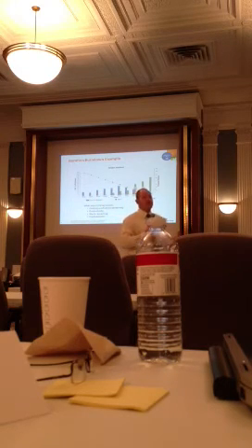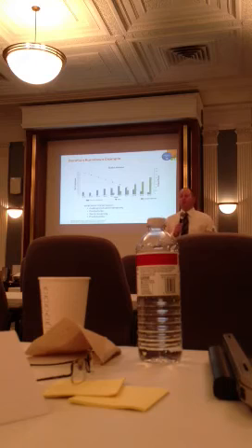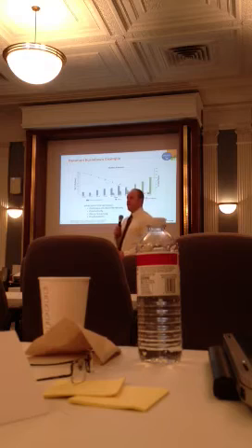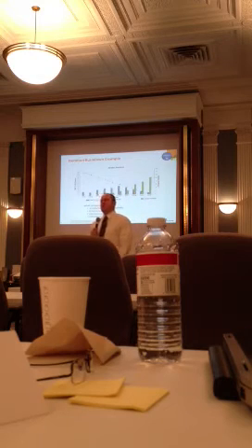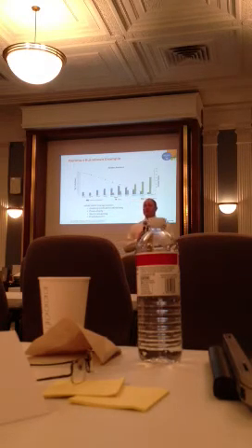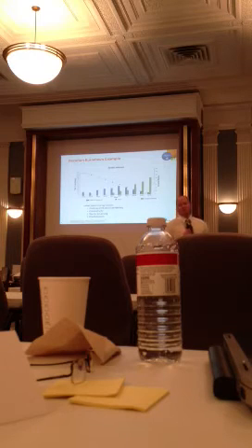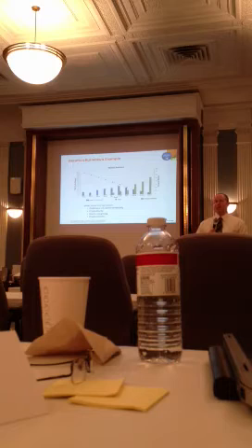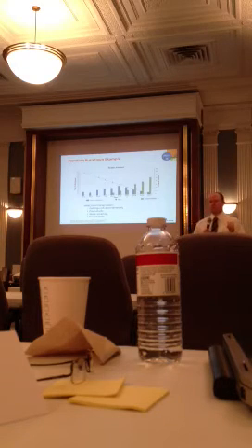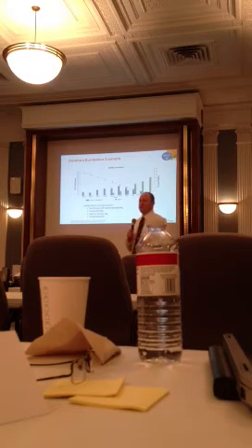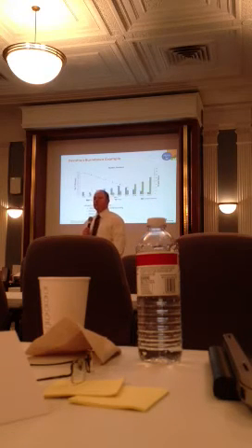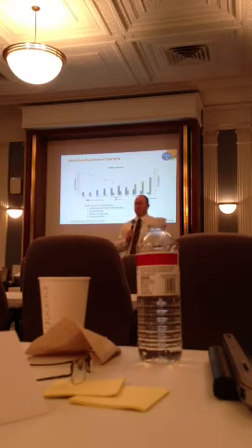So if you're confident that you can just make all the save functionality one user story, and you're confident you're going to be able to deliver on it, okay, fine, maybe you create one user story for that. The danger being, if you make it 95% of the way through that user story, and it's a 13-point story, and you don't finish, you get 0. Right? Whereas if you broke that down into 13 one-point stories, well, you could still get acceptance on the 12, and you just didn't get acceptance on the 1.